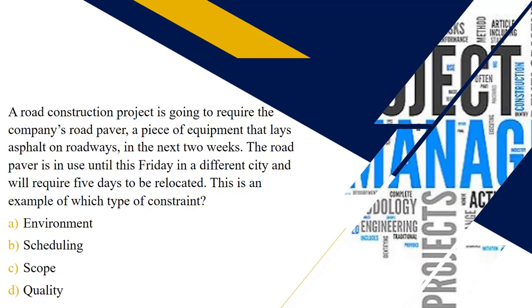A road construction project is going to require the use of the company's road paver — a piece of equipment that lays asphalt on roads. The requirement is needed in the next two weeks, but the road paver is in use until this Friday in a different city and will require five days to be relocated. This is an example of a scheduling constraint, because similar to the availability of people with certain skills, equipment availability and scheduling can also lead to a constraint on a project.